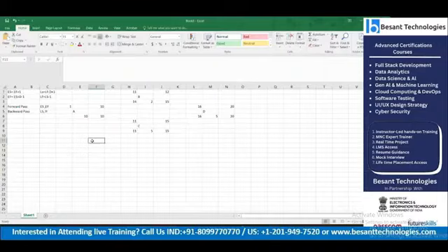It's 10. Okay, apply the value in the formula: 10 minus duration, 10 minus 10 plus 1, 1. Okay, so we have identified the early dates and late dates using forward pass and backward pass.